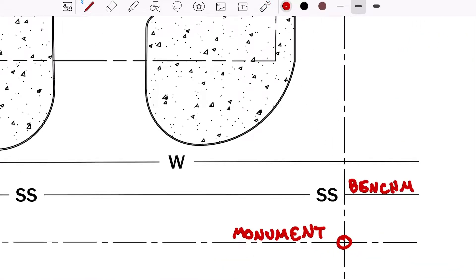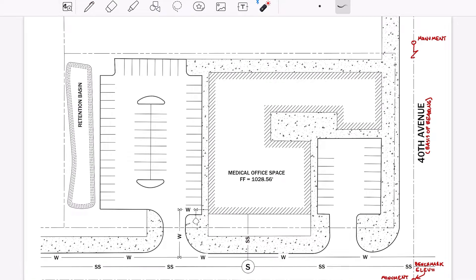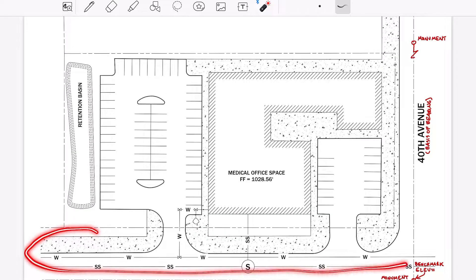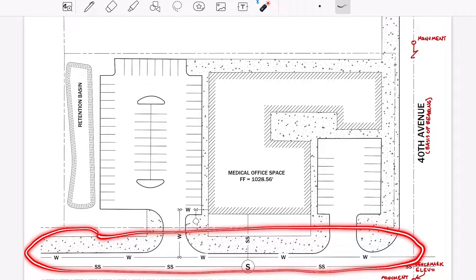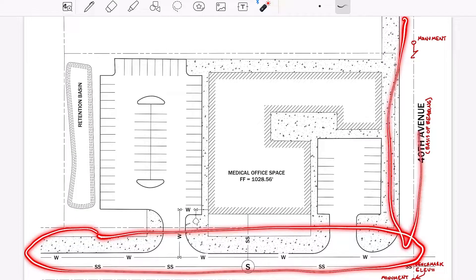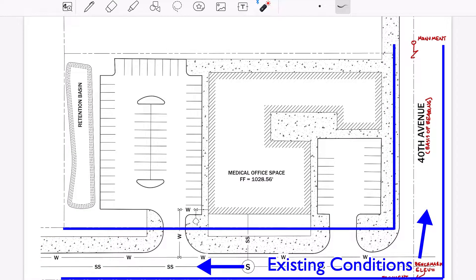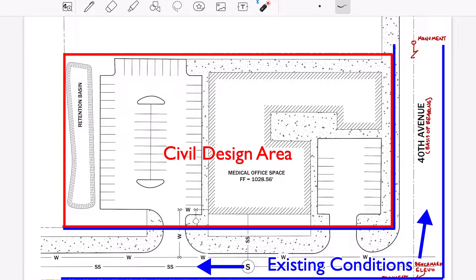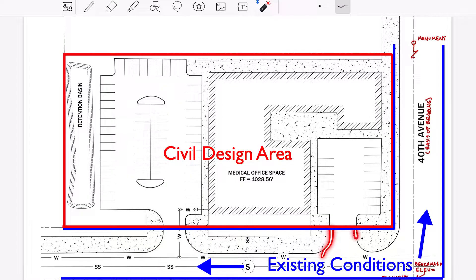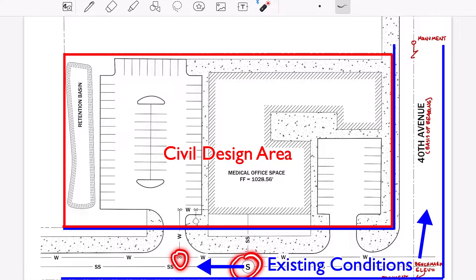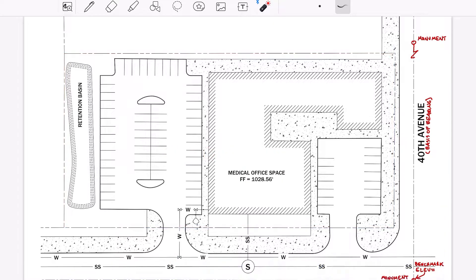I say verify because the property itself and surrounding existing conditions have likely already been surveyed through a civil engineering firm in order to come up with a civil design for the new site and ensure that it connects properly to the surrounding roads, sidewalks, and utilities. This design is represented by the civil plan set.